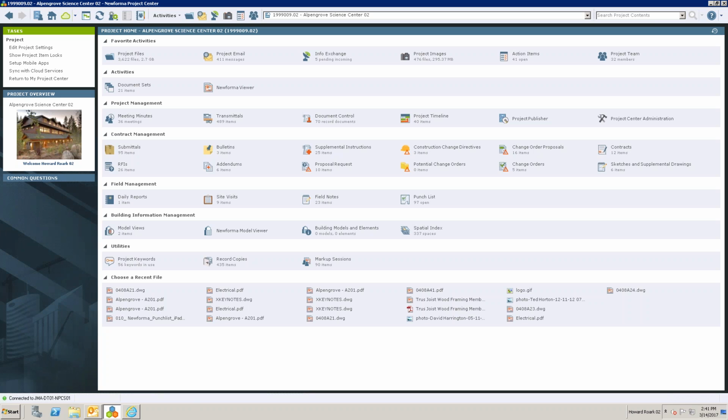All right. So submittals and RFIs. What are you guys doing for submittals and RFIs right now? Are you guys playing construction management on a lot of this, or is it you want to give them a platform? Yeah. Most of the time, RFIs, submittals, et cetera, go to the architect, and we're CC'd. Okay. The architect owns them in a sense. And then we're CC'd. We'll do a review and send any of our comments back to the architect. Sure. Then the architect will take that and send it back to the contractor and then CC us.